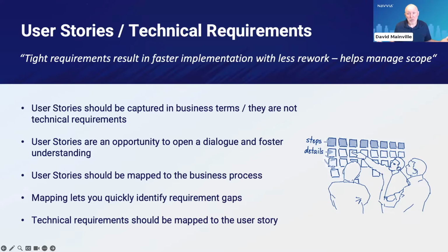And you start with user stories. And user stories are tightly aligned to the process. So as you step your way through the process, each step in the process might have one or more user stories associated with it. Talking about how something is submitted, how something is notified, who needs to be notified of something. What do you need to kick off a certain process? So these user stories in business terms are the first step in really understanding.